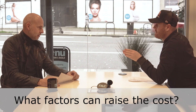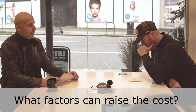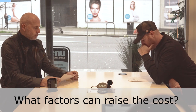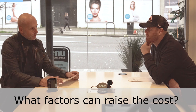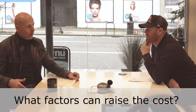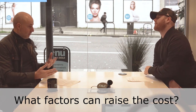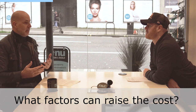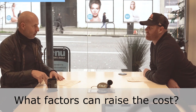Right, well, we've got a few more to go, Nick. What factors can raise the costs? Right. So when we do a scope of works and we agree a price with a client, we always factor in a contingency, maybe 5 or 10%. Because when you're doing a basement, especially under London, you never quite know what's in the ground. During World War II, there were lots of bombs dropped everywhere. There are surveys showing where all the bombs are, but if it's a Victorian terraced house and it's still standing, there's not going to be any bombs. But you never can tell what's in the ground.